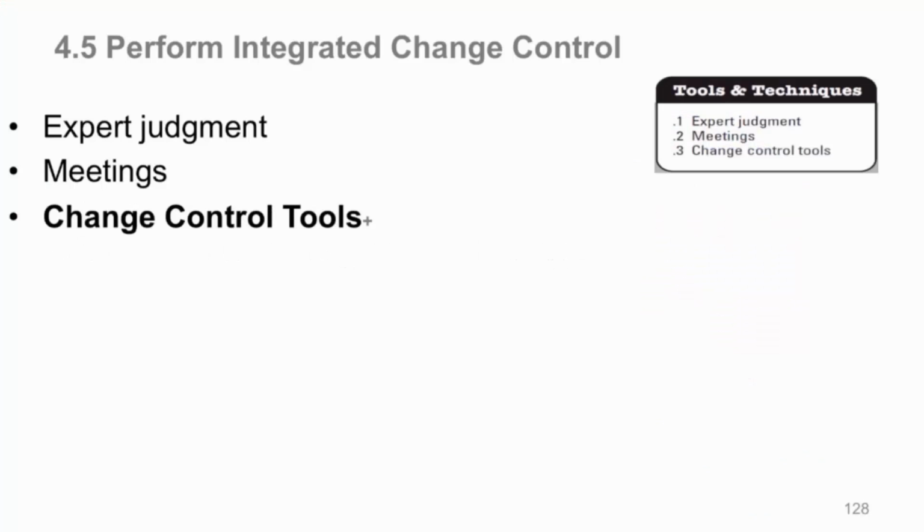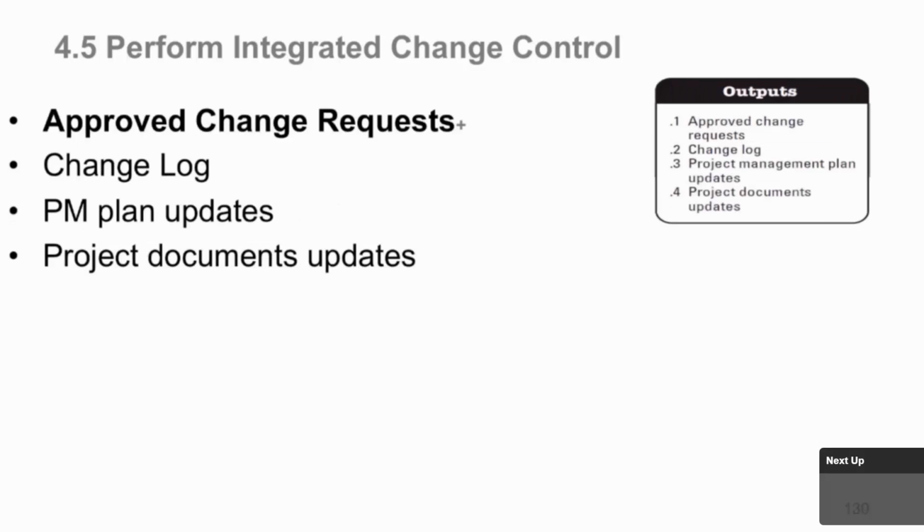And you have certain change control tools at your disposal, hopefully. They could be either a manual paper change control system, or some automated tool where you put in all your change control data, and it's reported to all your constituents and then to your change control board, of course. They'll make the decision, enter their decision in there, and it can go through your PMIS into your doers that are creating your deliverables, so they can make the proper adjustments. And in a second, we're going to wrap up this particular process with outputs.